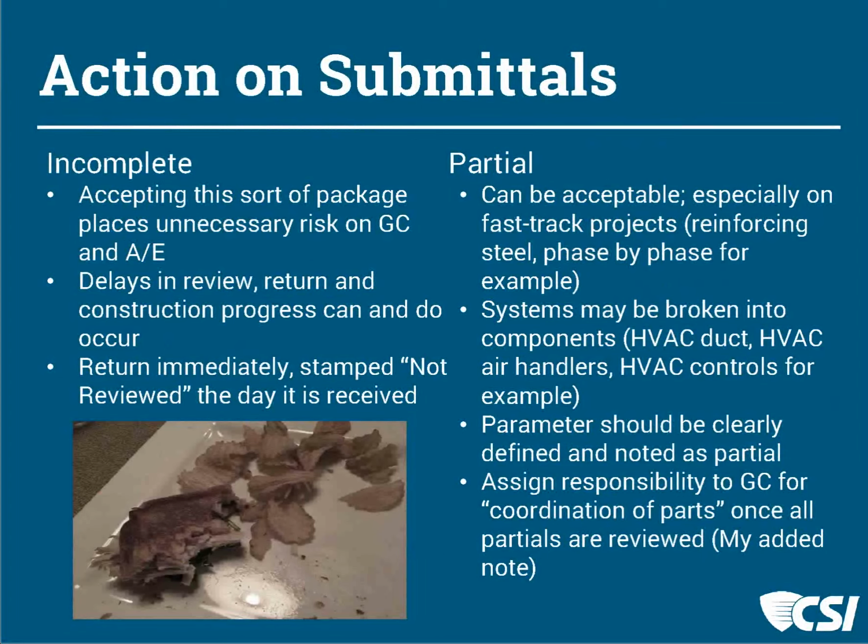And if you can send it back the day you got it or the day after, that is critical to the timeline on the project and might be very advantageous to you and to the contractor. So a package can be incomplete, and is sent back to be completed and processed properly.